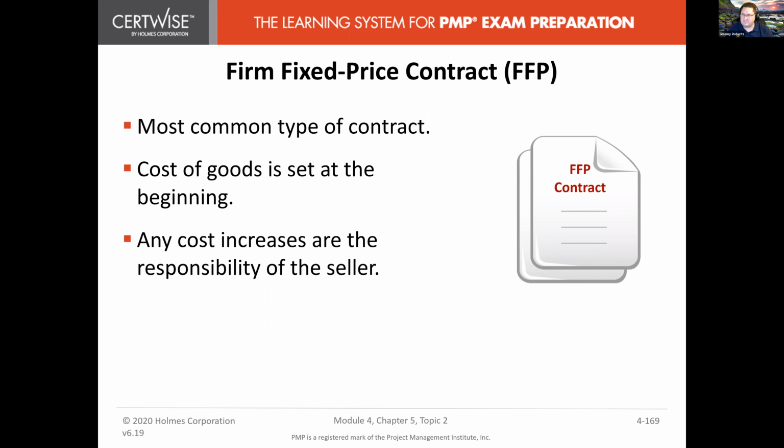Yeah, because the price has already been fixed and agreed to in the contract. The only option your seller might have is to terminate the contract under whatever terms are in the contract. But if they do that, they might lose future business from your company. So it's a dangerous game for them to decide to terminate a contract. But it might be more profitable to cancel the contract.